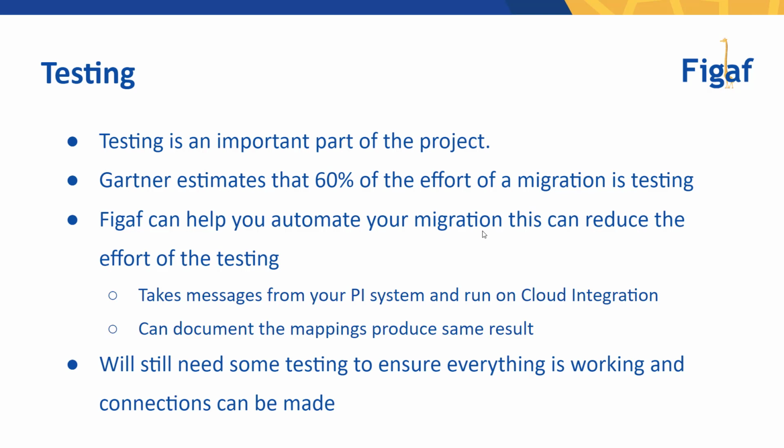Gartner is estimating that migration testing efforts are 60% of the migration process, so it is something that you need to look into. And you don't want to go live with something that you have not tested. That is just going to be a lot of pain for both you and the company. In the FIGAF tool, we do have a tool that allows you to automate the testing, and we believe that this can reduce the effort of your testing.